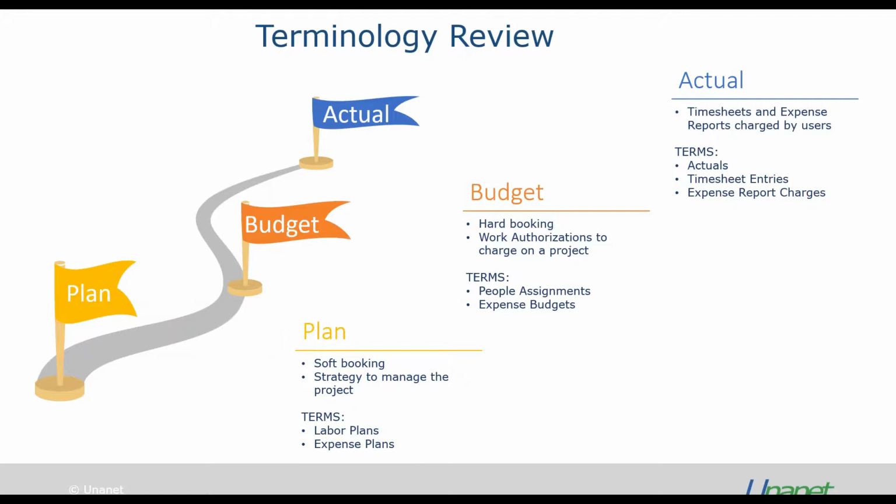So you're going to hear me say the terms labor plans or expense plans. However, when we move those plans over to the hard booking, that would be the work authorization, where we actually allow people to charge their timesheets and we allow those expense reports to be created.